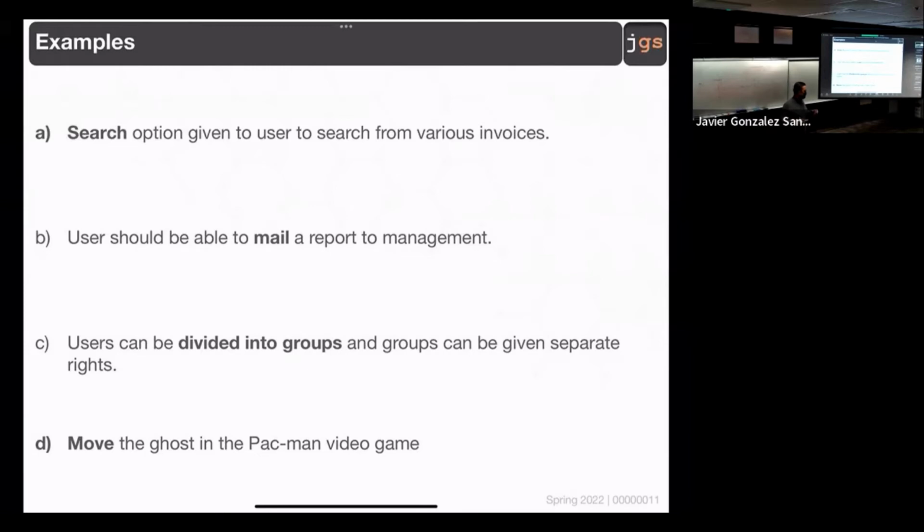Could be. Talking about this small idea, the ghost in the Pac-Man video game, is it too small? And hopefully you agree with me, no, it's not too small. These guys move in some way that is smart, and we need to program that smart way for them to move. So it's not something that one person is going to implement. It's something that is going to take days, not hours. So, yeah, it's good enough for the requirement, it covers the INVEST, we can move forward.